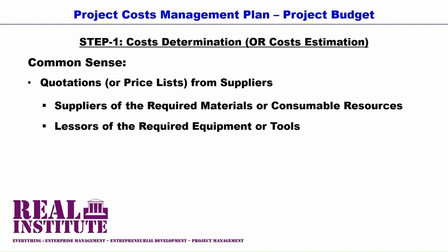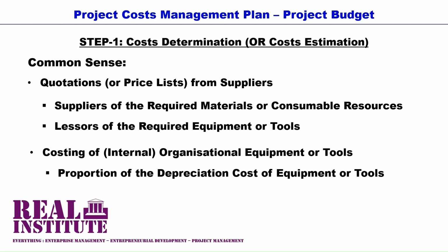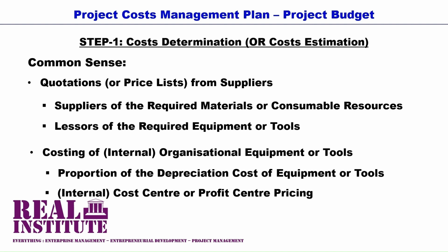In cases where the required tools or equipment for your project are sourced from within your organization, the cost for their usage could be determined by their depreciation costs in proportion to their usage by your project. Or the cost for their usage could be determined by pricing from their respective cost centers or profit centers from within your organization.